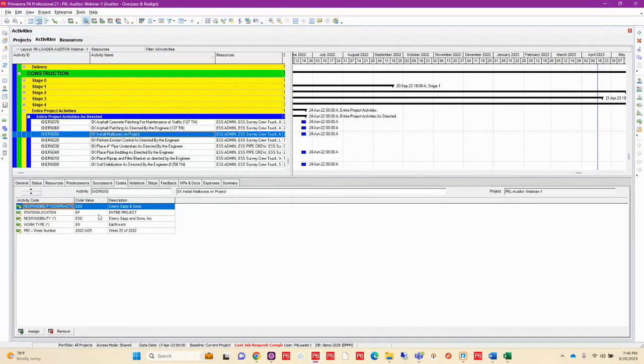Yes, we've had that happen where somebody has deleted an activity code, thinking it was no longer used, but indeed it was. I can go back and find those and reinstate them again, because you want to get your full dictionary. Then when I import my XML file, it's going to have the assignments in there for me. Then I can take the last however long a time period, maybe if it was 4 days later that you noticed it, I could get all the additions and the changes made to my project in Auditor,